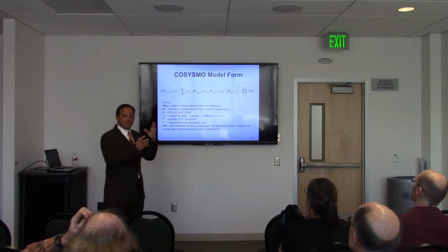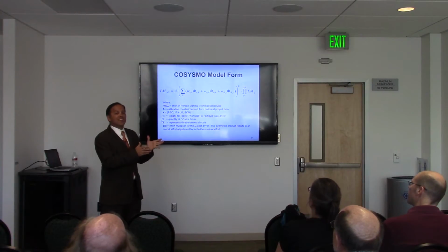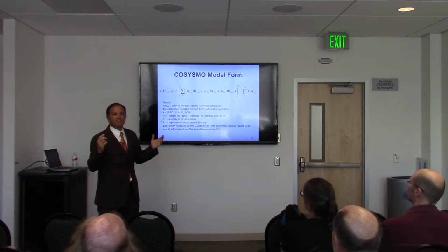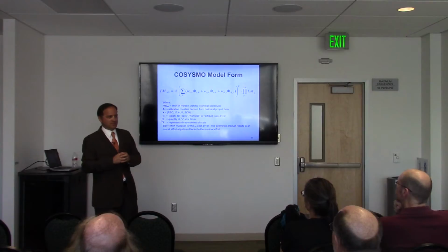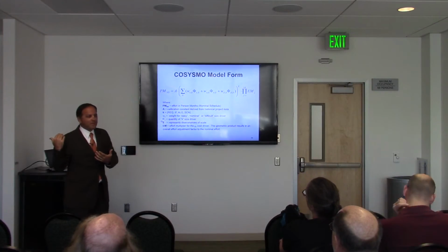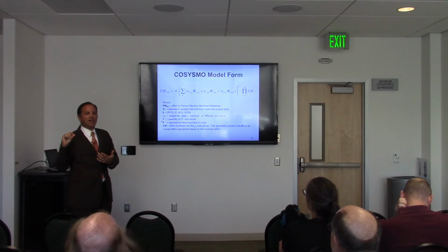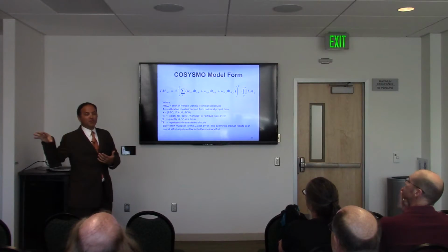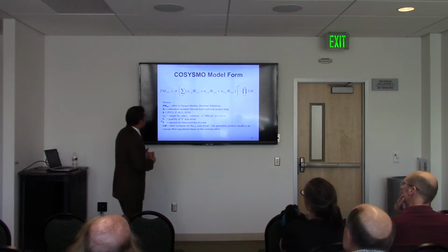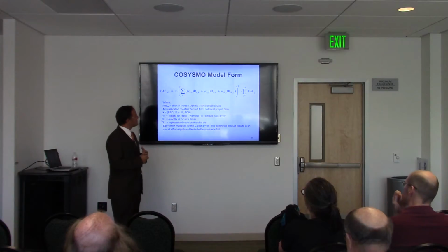distinguish that is a difficult requirement may be something that you've never done before, or it's just inherently expensive because you need, I don't know, a $3 million test facility to even demonstrate that it works, right? Whereas an easy requirement may be something that you've done a million times before, or you're going to buy it off the shelf. So it's not going to cost you too much in engineering effort. It will cost you in licensing fees, but that's a different part of the cost model. So the weighted sum, again, is a way to characterize the functional size of the product.